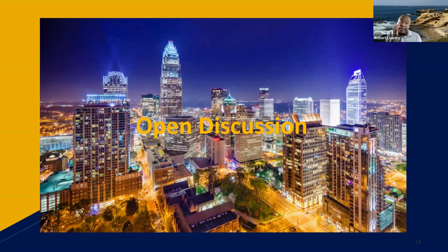Yeah, and that can go back to deferred submittals, like your fire life safety, fire sprinklers, it's almost a design build. If it's so vague, then like Jane was saying, I'm going to do an allowance, or I can do a not-to-exceed number because it's so vague. And that goes back to knowing your cost per square foot to get you a number when it's so vague. And like I said, if it's old materials, a lot of it is going to be out of code. You have to account for that. If it's more than 20, 30 years old, the code has changed, so you have to allow for that. So when it's that vague, just say, here's an allowance for me to do this, a not-to-exceed number, time and material, something like that.